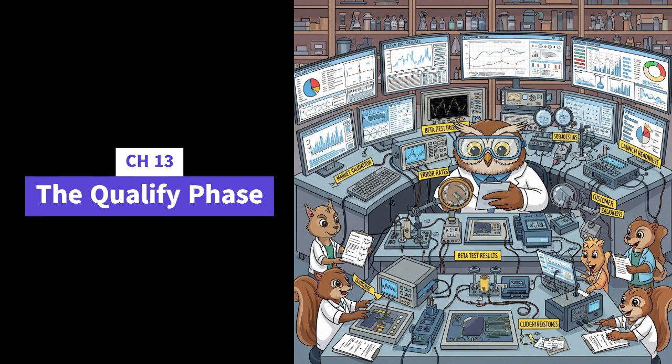Needs careful planning. And for physical stuff, you actually have to print it and get it in the box. Exactly. Printing, putting it in the bill of materials, considering lead times. It all has to be ready for launch. So even docs can impact the timeline. And like everything else, changes here can affect the main launch plan and costs. Precisely. The goal is simple, though. All required documentation is done, translated if needed, and ready for distribution when the product launches.